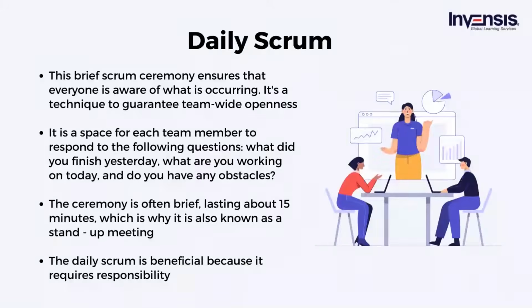Second Scrum ceremony is the daily Scrum. This brief Scrum ceremony ensures that everyone is aware of what is occurring. It's a technique to guarantee team-wide openness. This is not the time for a deep dive into the details. This is not a comprehensive status meeting, but rather a fun and interesting gathering. It is a space for each team member to respond to the following questions: what did you finish yesterday? What are you working on today? And do you have any obstacles?